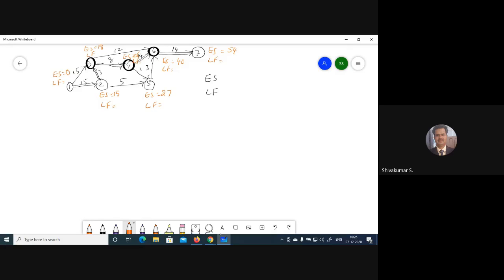So this event can finish only after 54 weeks only. Okay, we're giving the reverse now, not because of start time and finishing time. So event 7 can complete after 54 weeks only because the earliest start is 54. So then immediately time only can start, nothing but a 0 you can say from this side.